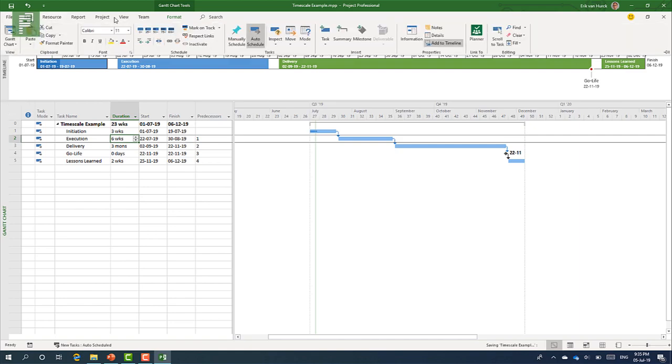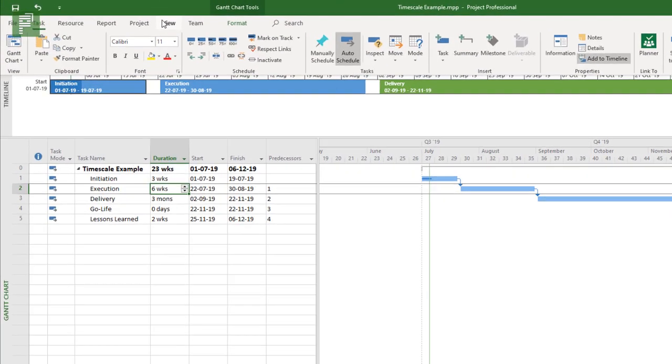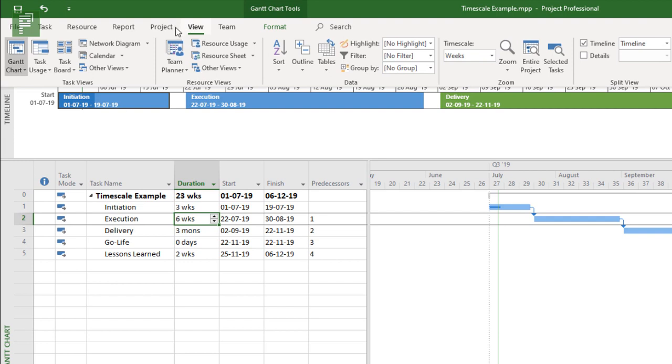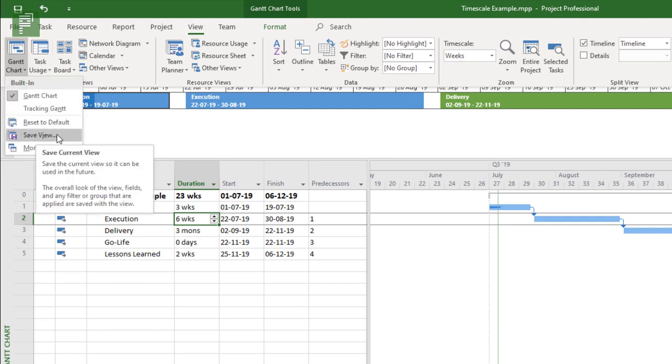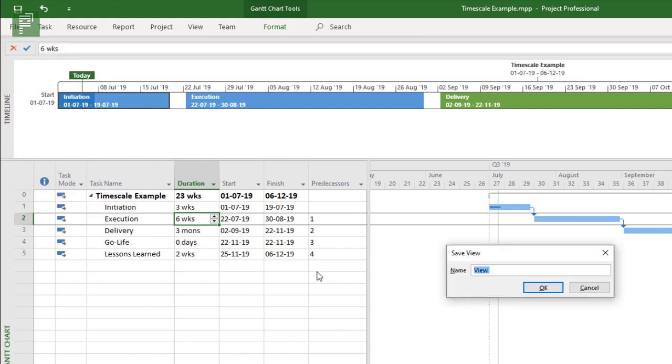I cannot save this timescale. There is no saving option in this timescale bar, which is a shame if you ask me, but stepping over that, there is the option to save this screen or this Gantt chart the way it currently is. And we go to view. Then we go to Gantt chart and we click on save the current view. The views, the fields, and any filter in the group that is applied are saved with this view.